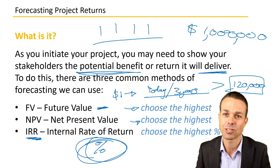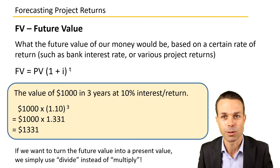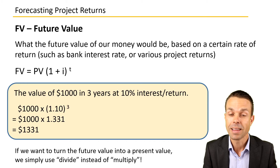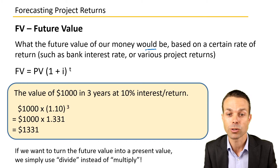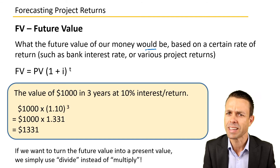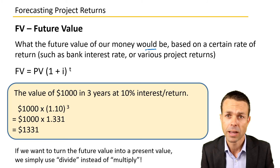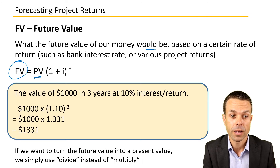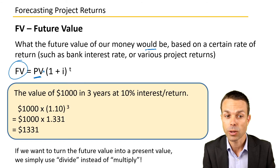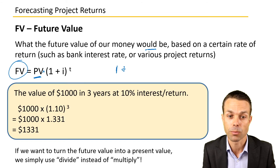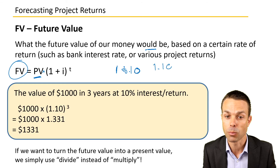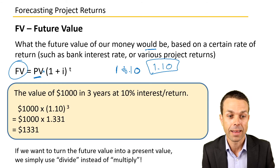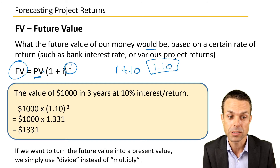Future Value is what our money would be worth based on a certain rate of return, like an interest rate of 5% or 10% per year. The formula is: Future Value equals Present Value multiplied by (1 + interest rate) to the power of time. For example, at 10% interest, that's 1.0 plus 0.10, giving us 1.1, raised to the power of the number of years.